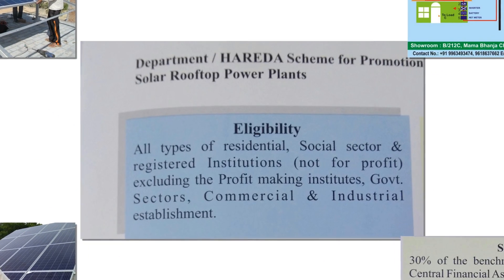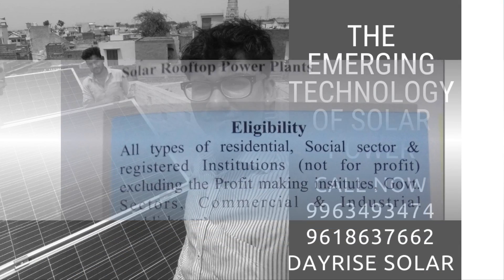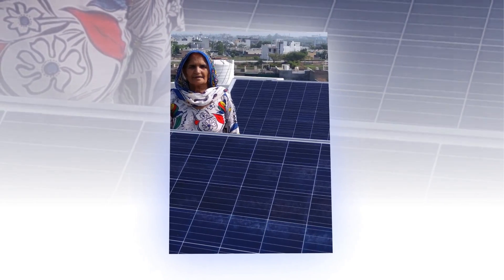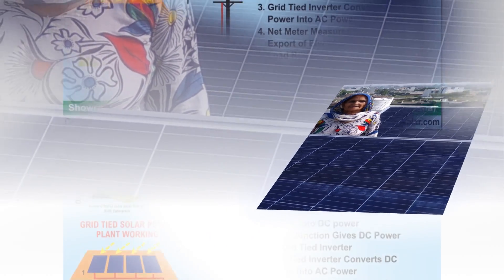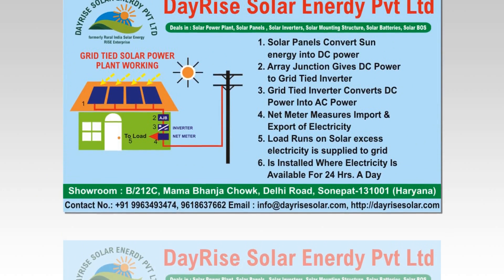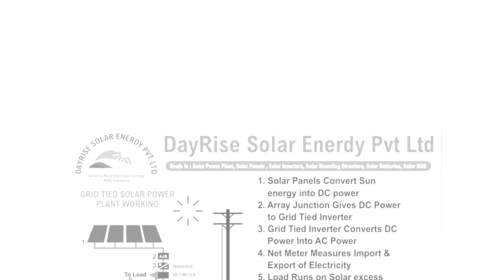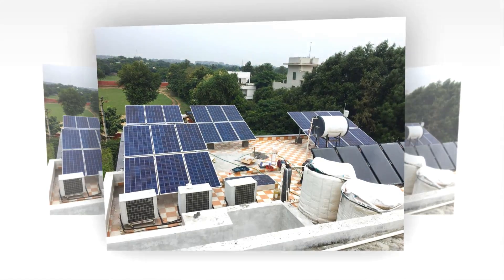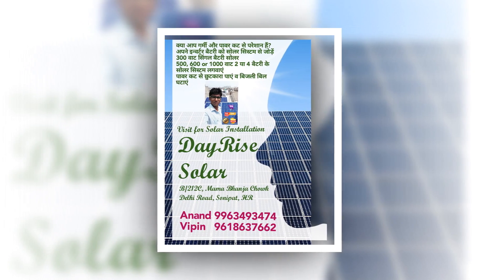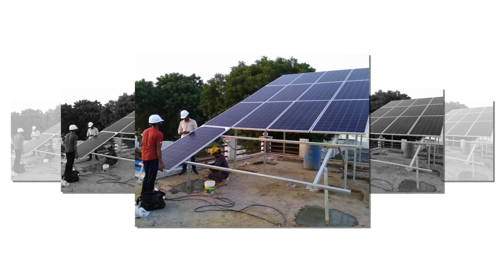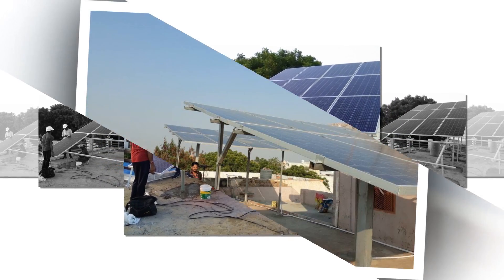Step 5: An application along with a fee of Rupees 1,000 for installation of net metering is submitted to the STO Operations of the concerned DISCOM utility. Step 6: Upon acceptance of the net metering application, the user may select an EPC company, solar vendor or solar developer for installation of the grid connected rooftop solar power plant. A Power Purchase Agreement (PPA) for the grid connected solar power plant is also signed between the user and the DISCOM utility. Step 7: Place an order with a reputed and established EPC company or solar vendor of your area after thorough search and a proven track record.